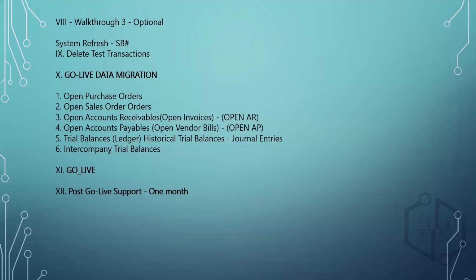Okay, only the transactions like purchase orders, sales orders, journal entries, advanced journal entries, FAM depreciation entries. It could be your work orders, assembly builds, right? All these things will be deleted because that is only test transactions. Correct, only the test transactions we create, because you do not want to carry forward the balances onto these accounts, right?